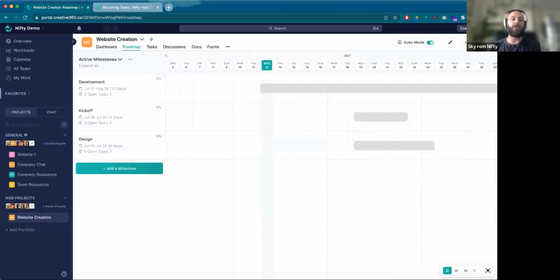So that's the key distinction. Now, when you're asking about editing templates, there's no way to pull up a template and edit it. What you would do is create a new project from that template, make whatever changes you'd like to that, and then save a new version of that template. And then it's not going to impact any projects that were created originally from that template, but it will allow us to use a refined version. You might call it V2, you might delete the old one. These are decisions that are up to you, but it will help you make perfections on it in the meantime.